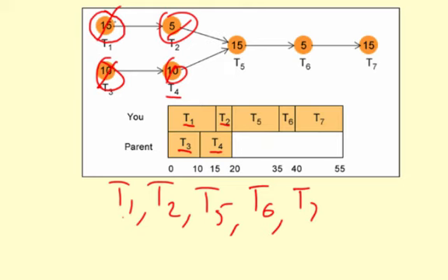but that's basically how you do it. You just determine the critical path, start the first process, cross it off, do a new critical path calculation, find the one that starts the next critical path, cross it off, and so on and so forth. So that's the big picture for this lesson.